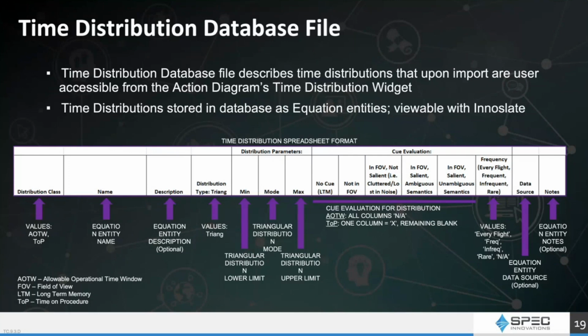And what is that? Well, we kind of know how long it's going to take. What's the best case? What's the worst case? And what's most likely to be, right? Well, that's your triangular distribution, and so you can use that. I've used that over the years as well on projects. It's a very great starting point until you get better data to create a more complete distribution. And sometimes you never get better data than that. In fact, that's one of the things that they determined with the work that they were doing at George Mason, was this was the best form that could be done.